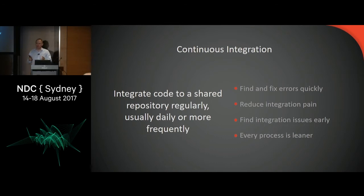The other area that this addresses is that right at the end of the sprint, someone's been working for a week and a half, and you look at the code and you say, this wasn't the design that I intended. You've made a mistake. Sorry, you can't commit this. Like, you're going to have to start again. That's really demotivating, and you've lost an entire person's worth of work for the sprint. And maybe it'll be quicker to do again, but really you want to find that stuff out earlier. So if they're committing code and you're doing reviews earlier, you can catch those design issues much earlier and make sure that you actually capture the value at the end of the sprint.